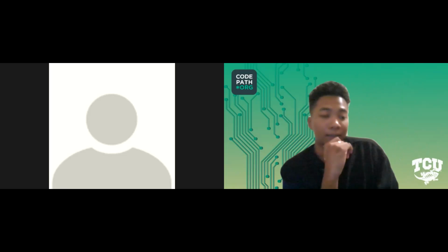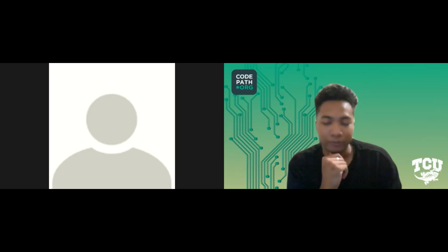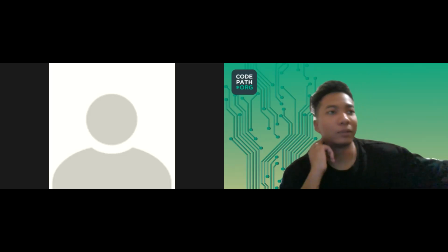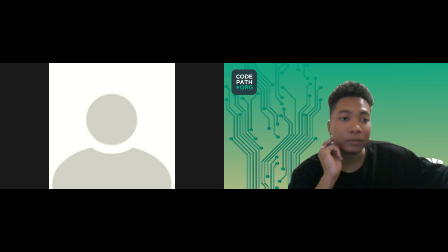With direct messaging, I think when you are looking at the MVP, you can probably move that out for now. Is it hard? I wouldn't think it's too hard, but it's still time consuming, and you would be better off using that time to polish the app, since you can just use commenting.